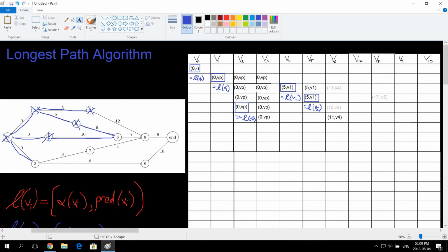because our method says that for the longest path, we must always pick the highest possible value. This is V6. Now I can cross it off here, and I've got two outstanding lines, but I can't write down the value of V8 just yet because I still need this V7 to have a cross by it. Okay, so let's just take all that off.